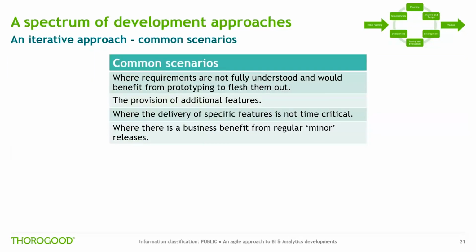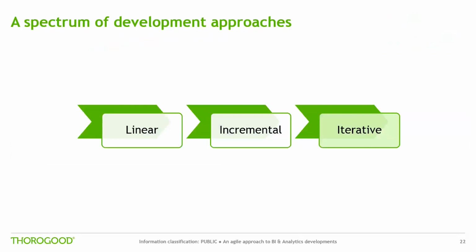Common scenarios for using an iterative approach are where requirements are not fully understood and would benefit from prototyping to flesh them out, for the provision of new features where an application has already been implemented and fundamental design issues have already been addressed, where the delivery of specific features is not time critical, and where there is business benefit from regular minor releases.